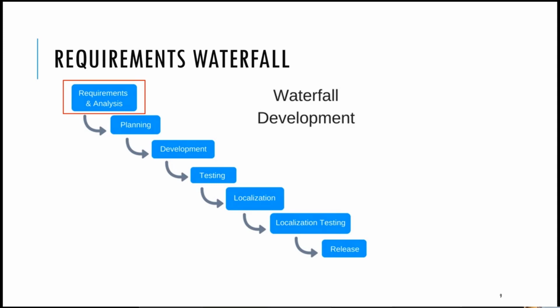So you just do your thing as a requirements engineer, gather all the requirements, and when you're done, the others get to their work. And maybe you're not even part of the project anymore. If there are changes in the requirements, it needs change requests. But this is typically not done by the requirements engineer, but by the project manager.